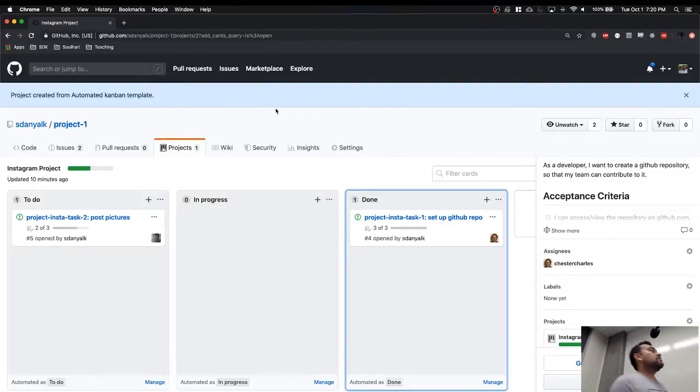Okay, it's a meeting. It's a really short meeting which runs like 15 minutes. That's all. It happens every single day, every single morning, without fail, whether anybody shows up or not. But it has to happen. It's called daily stand-up.